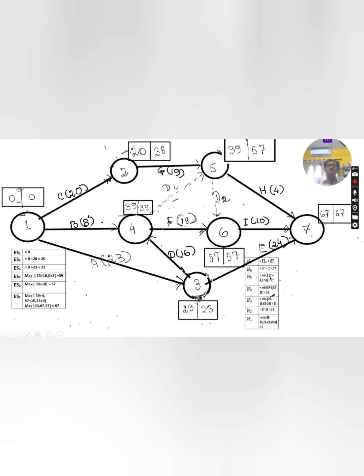Now S2, only one activity is coming out from this node. Only one activity is coming out from this node. That's why latest finish time 57 minus 19, because you have to complete this task also. So what is the latest time we can start? 57 minus 19 is 38.